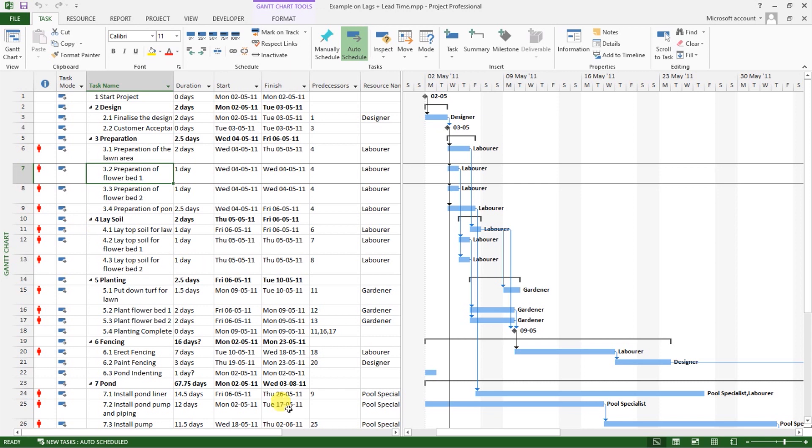Now, by definition also, a non-critical task is the one that if you adjust it by maybe altering the duration or the start or finish with the application of lags and lead times, this is not going to affect the overall project duration and the critical path will remain the same.